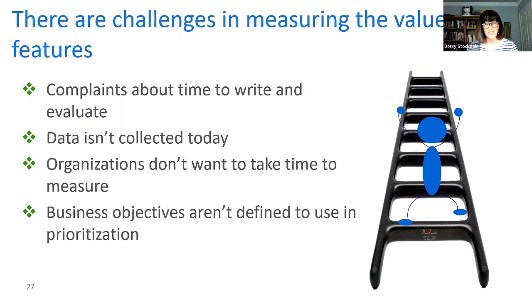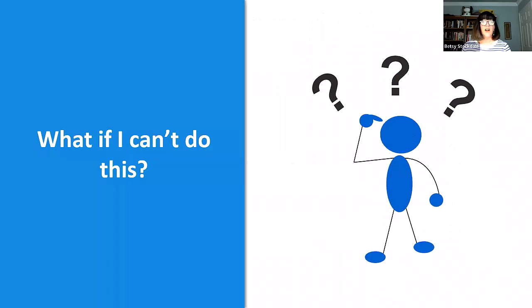The deadline has to change. We need more money, need more resources, or something else has to come off the list, right? We have to make those decisions. But consciously saying, yes, we're increasing the scope of this project allows us to say, yep, we can do this.